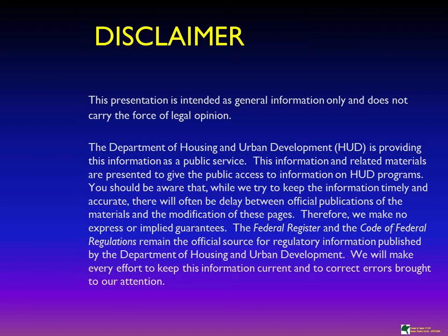We've had that situation actually happen at a couple of HUD projects. And I can't really tell you exactly what to do, but I can tell you what we had to do, which is the multifamily office had to rebid that balance of that work, and they had to work with the bonding company to finish out that portion of the work. So that's what, in the multifamily world, they had to do. We were in support of that, as they restarted that project, new payroll started coming in.